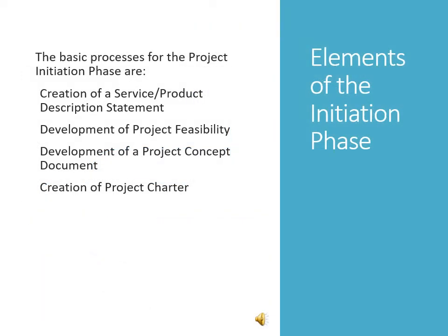The elements of the initiation phase, in fact the basic processes for the project initiation phase, are firstly creation of a service product description statement, development of a project feasibility, development of a project concept document, and creation of a project charter. In fact, we will cover all these elements during our session today.